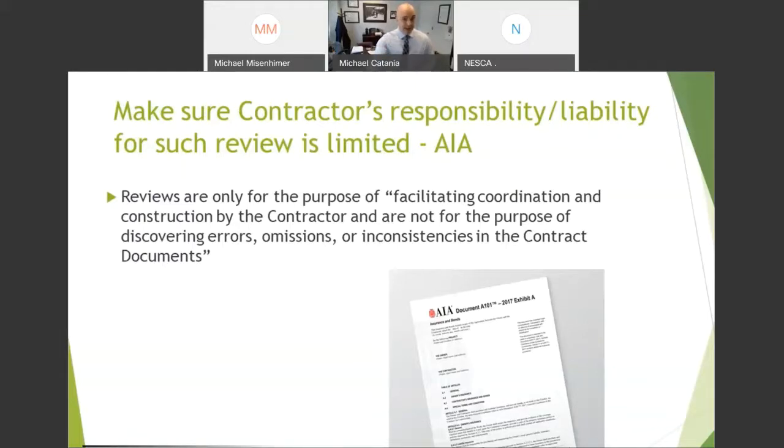With the AIA contract, if you're getting a modified AIA contract, whether you're a sub or a GC, it should be redlined, so to speak. You're going to see in the margins where it's been changed, and it should come with an additions and deletions report, either attached to it or actually redlined in the agreement. If it doesn't, you need to ask for it. Don't assume that you're signing the form contract because you likely are not. Things like this may be taken out or altered and you may not catch it.